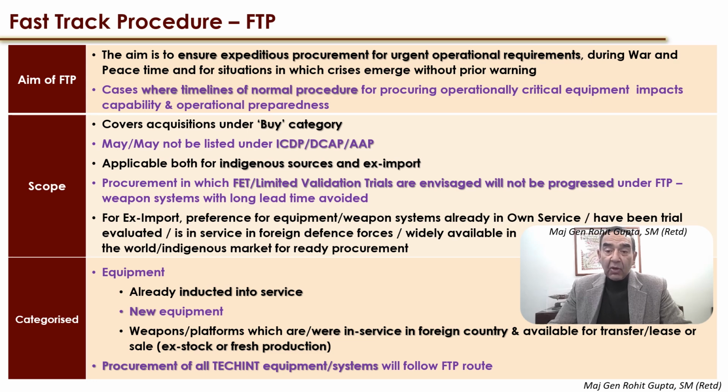These could be listed or they may not be listed under the 10 years Integrated Capability Development Plan, or the Defence Capability Acquisition Plan, which is of 5 years, or the Annual Acquisition Plan of 2 years with a 1 year roll on. So they may not be listed, and you can just take up a case ab initio under these provisions. They are applicable for import, that is foreign, and also for indigenous sources. It is not considered only for import items. It is for indigenous sources also.